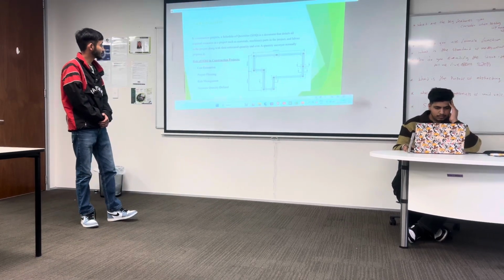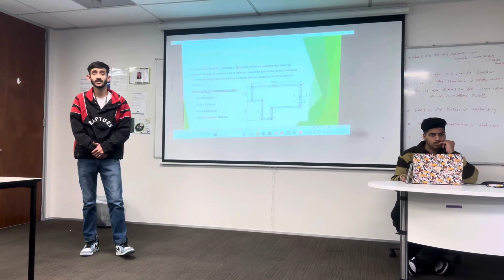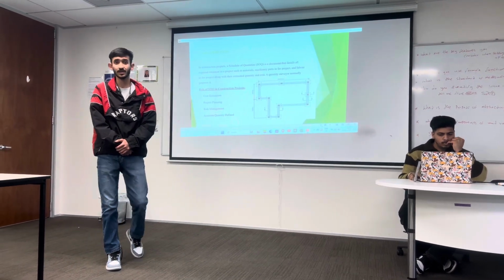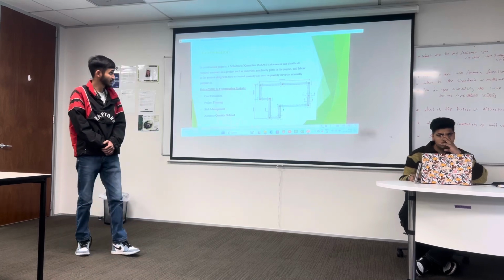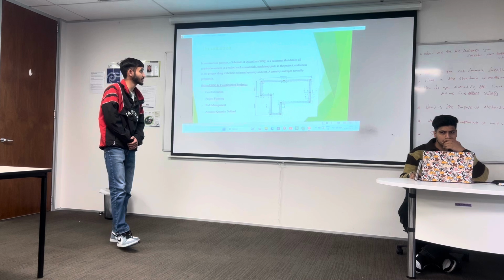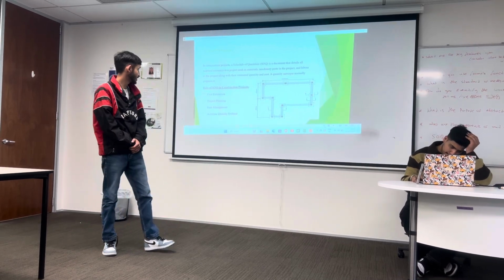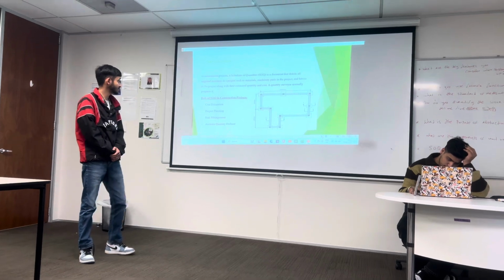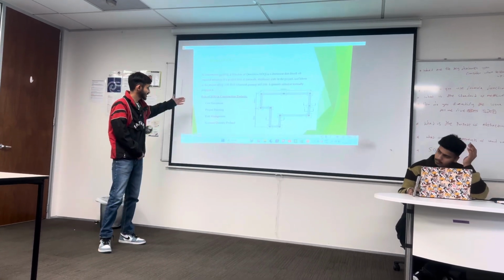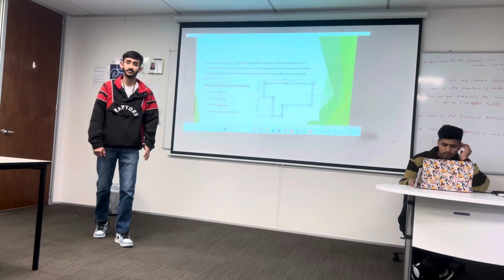So what is SOQ? In a construction project, a schedule of quantity is a document that details all the materials, machinery parts, and labor in the project along with their estimated quantity and cost. A quantity surveyor typically makes it. The roles of SOQ are cost estimation, project planning, risk management and accurate quantity reference.